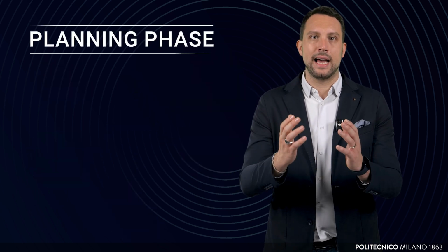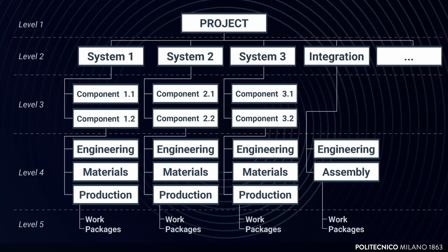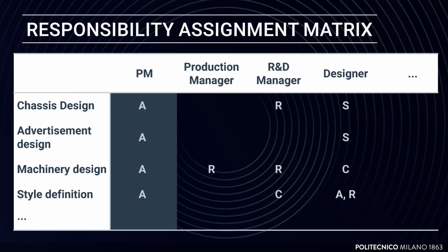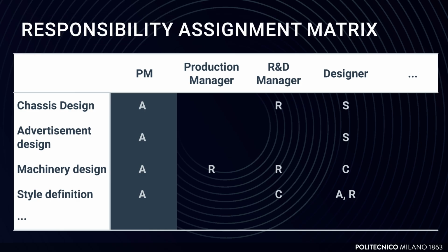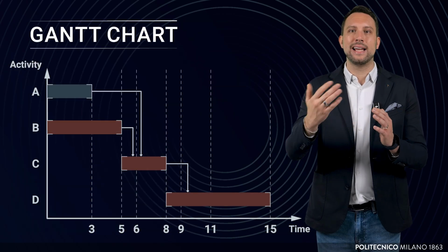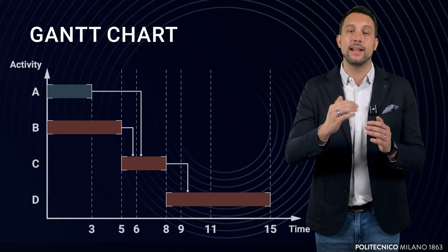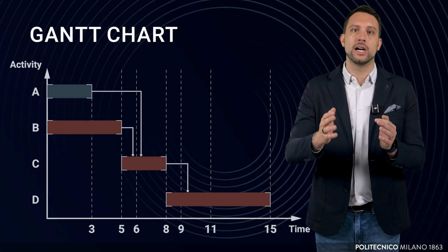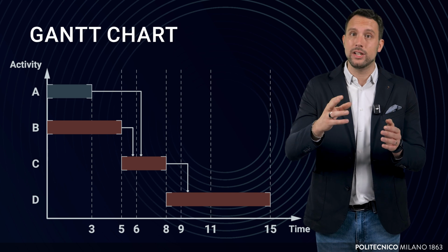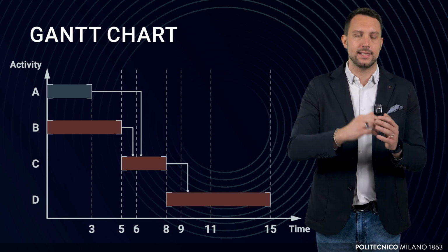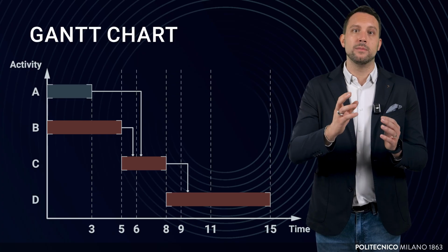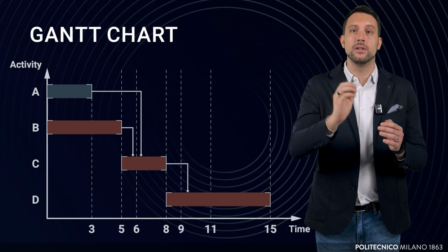The planning phase crystallizes the project structure. The team develops a work breakdown structure, WBS, that organizes the project into manageable sections, such as front-end design, back-end development, testing, and deployment. A responsibility assignment matrix, RAM, clarifies team roles, ensuring accountability for each task. A Gantt chart visualizes the timeline, showing task dependencies and deadlines. For instance, the Gantt chart might display that back-end database integration must be completed before front-end testing begins. Budget estimation occurs simultaneously, and resource allocation is meticulously planned.